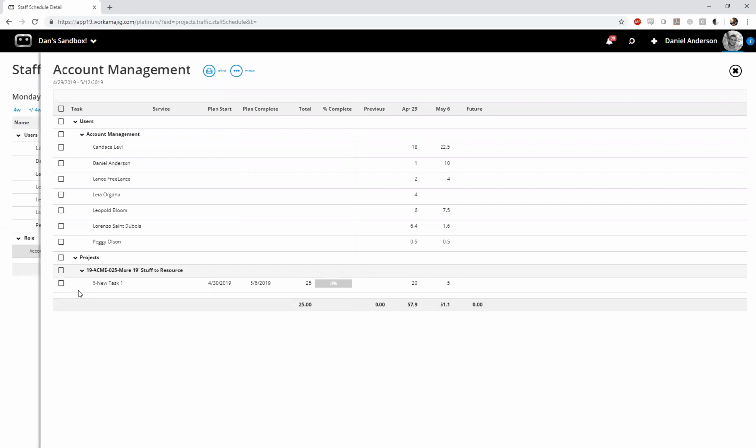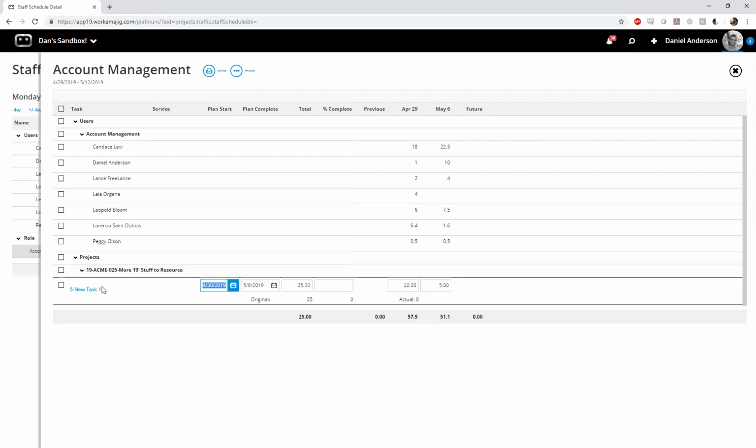But you do have the ability to set constraints that are hard dates, because sometimes things need to get to a vendor, or you just have a hard finish date for a task. It has to start or it has to finish on this date. We have constraints in your projects that will actually let you do that. And again, I typically would recommend to my clients not to change those dates unless it qualifies for that. I have to get something to the vendor and it has to be done by this date. So a must start on or a must finish on constraint, for example, will basically lock that task here.